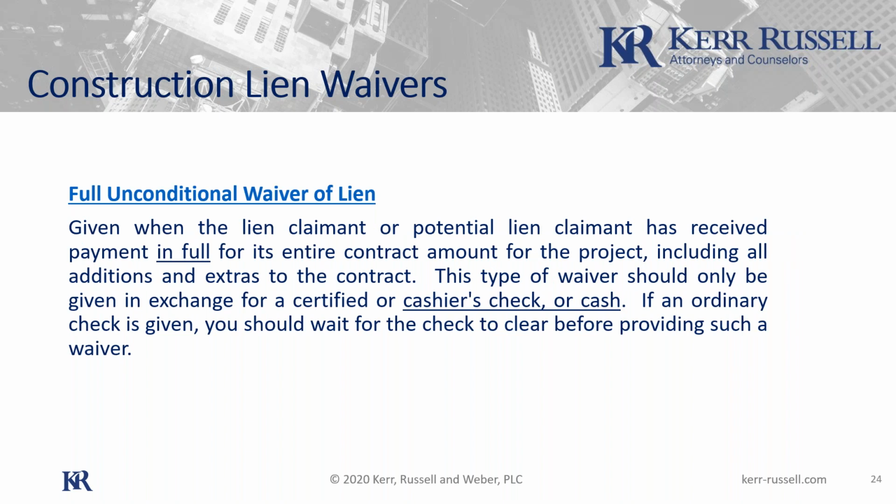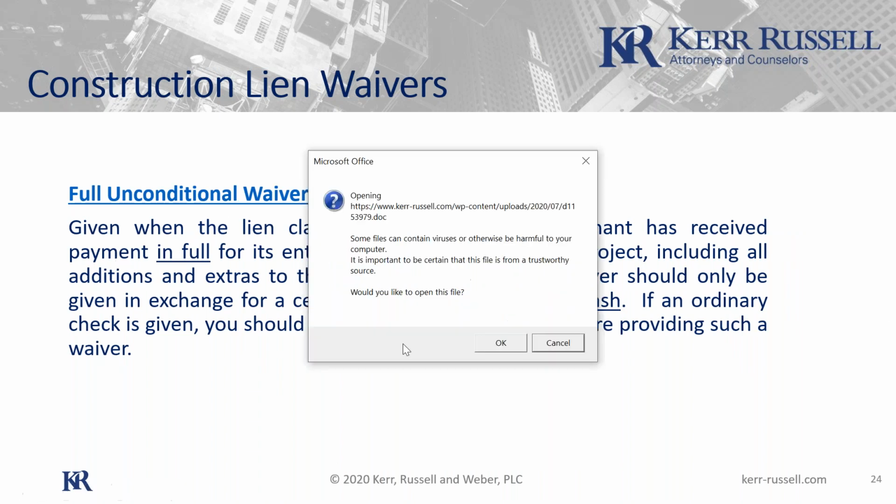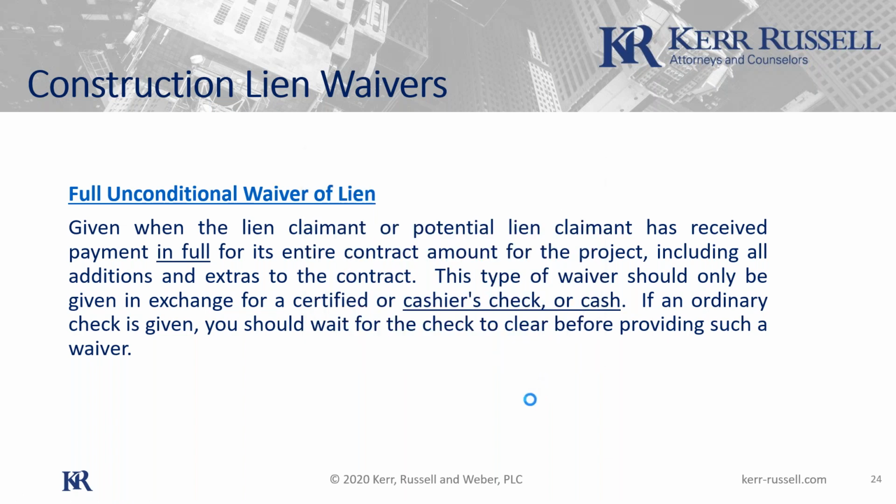All right, and briefly on waivers. You're all probably familiar with waivers on projects where, before you receive the payment, it's a conditional waiver. Often it's a partial conditional waiver that you give to the general and he submits with a pay application. Then he gets paid by the owner, pays you your part, and the next month they'll look for a partial unconditional from you saying, yeah, I got the money. It's unconditional, my waiver. I'm not conditioning my waiver on receipt of any payment. And then perhaps you'll give a conditional waiver for the next month's draw saying, but I am owed this next amount coming out of this next draw. So here's a conditional waiver for that, saying, conditioned upon my receipt of that money, I'll waive my rights.